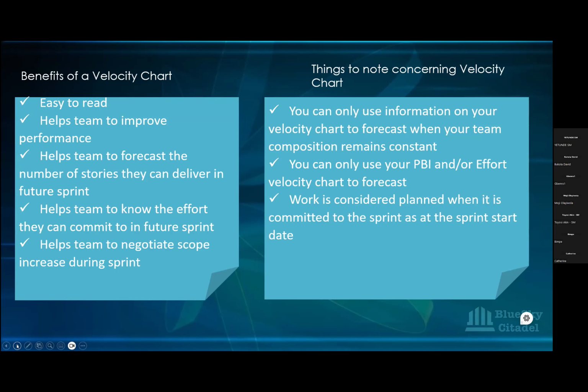We say it gives you an average velocity. So that's what you want to bargain with. And if you want to bargain with that, it's with your user story, because the user story is what carries the requirements, not your task. Your task just carries the activity you're going to carry out for that requirement. So the user story is the one carrying the requirements from the business or from the client. That's the one you want to track. That's the one you want to forecast on.